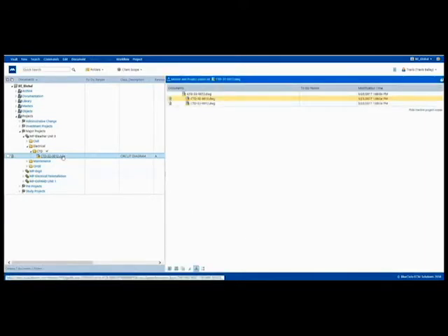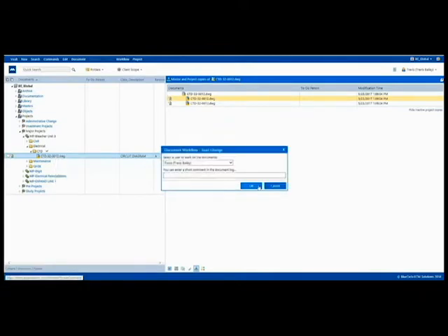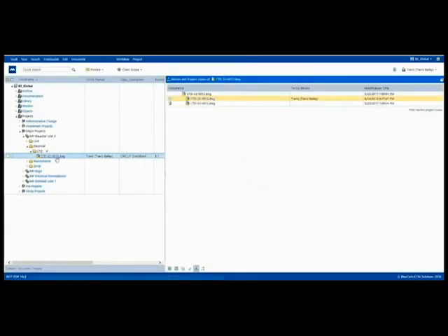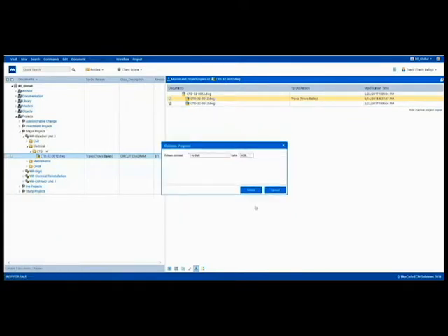So we see we're at the project copy. We can see the master as well. And so we now need to do route review to get it to the issued state so we can release it back as the master revision. So I right click and we'll start the change. I'll assign it to myself. And you can see the document's currently in change, so we're just going to keep routing this. Start the review, again just to myself. As-built as the release purpose.